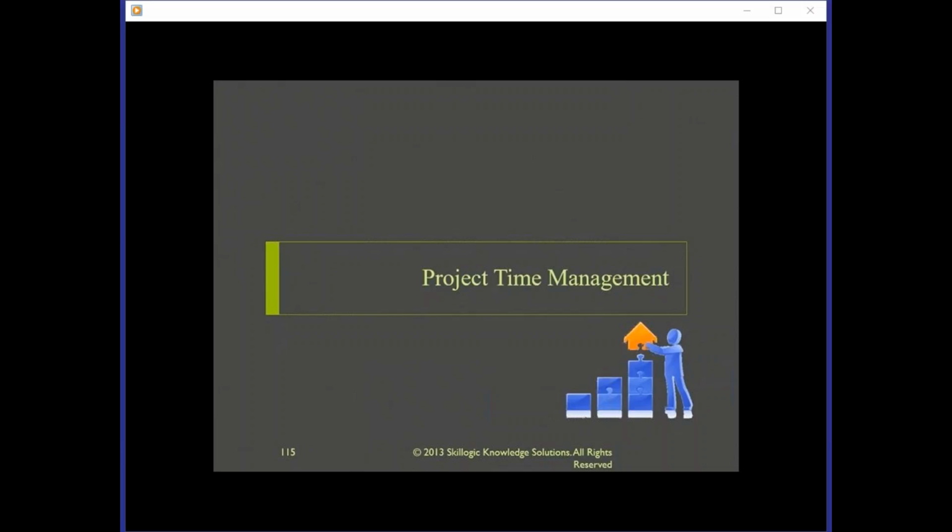Let's get started with time management. Now as we said earlier, remember we said about the CTS and the TCS, these are the iron triangle. Iron triangle is also referred to as the project triple constraints. Why do we call it a triple constraint? Any one dimension you change, the other two dimensions of the triangle have to change, otherwise it will be an imbalanced triangle. And the quality, which is in between this triangle, and the risk, which is an inverted triangle within this triangle, will get squeezed, which we don't want, right? One parameter changes, the other two parameters also change.